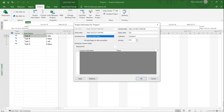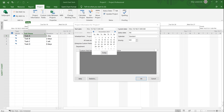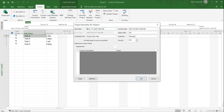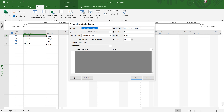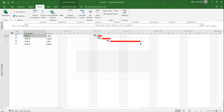If you schedule from a start date, which is the default, you put in a start date. Let's pick November 1st. Notice when I click OK and go back into Project Information, it calculates a finish date based on the start date I selected and my durations. Everything is now pushed out to November 1st — it moved everything from today's date, October 18th, out to the start date. So I've scheduled my project based on a start date and it calculated the finish date for me.